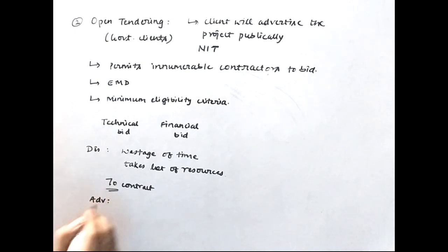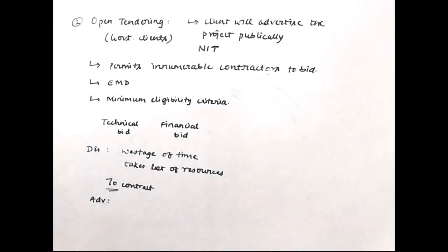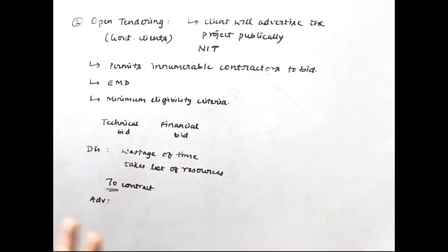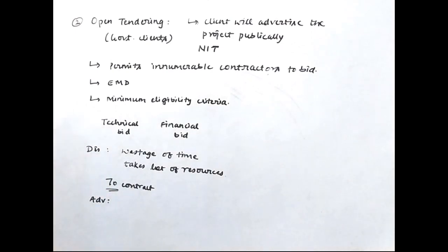If contractors win by chance without having properly worked out their rates, there will be many conflicts between them and the client. This is a very important disadvantage of open tendering. The advantages, however, are that the client gets a large pool of contracting agencies and can choose the best. New agencies with good prices can come into picture that the client has not interacted with before. Genuinely low prices can also emerge from the competition.